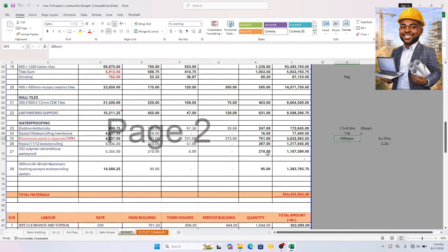So of course, if you use 100 square meters, you can tell how many rolls you are going to need given any particular figure. This is 307 square meters divided by 100. It tells you how many rolls you are going to need. At the end of the day, you have maybe 2 rolls here, 3 rolls here, 2 rolls here, 2 rolls here.